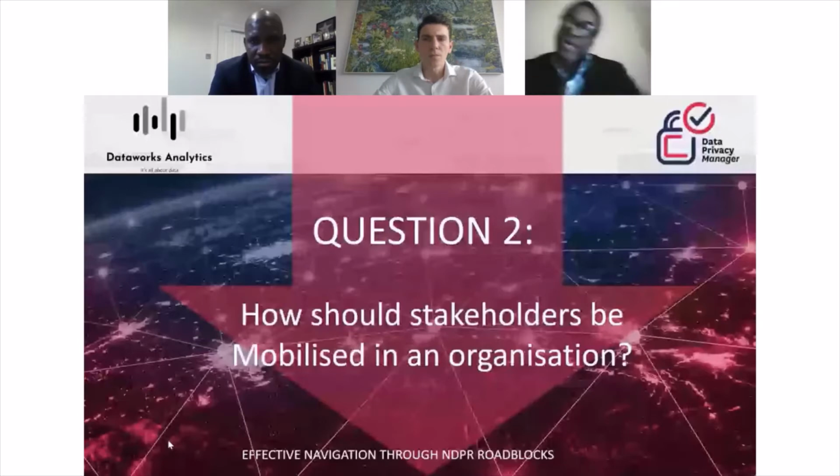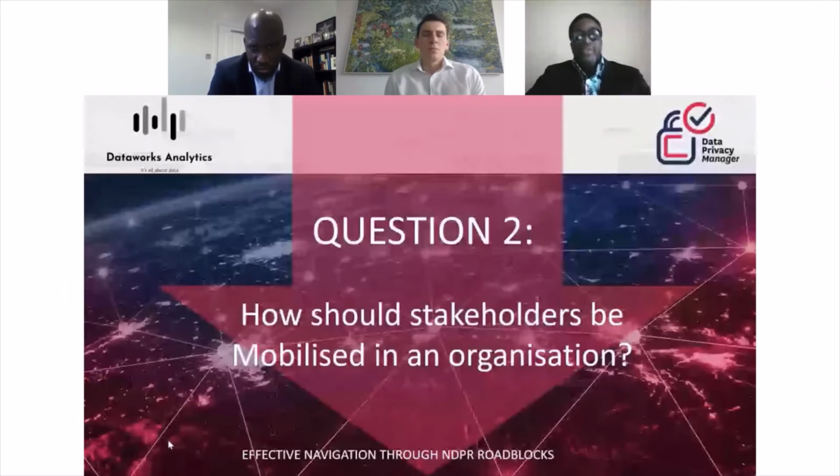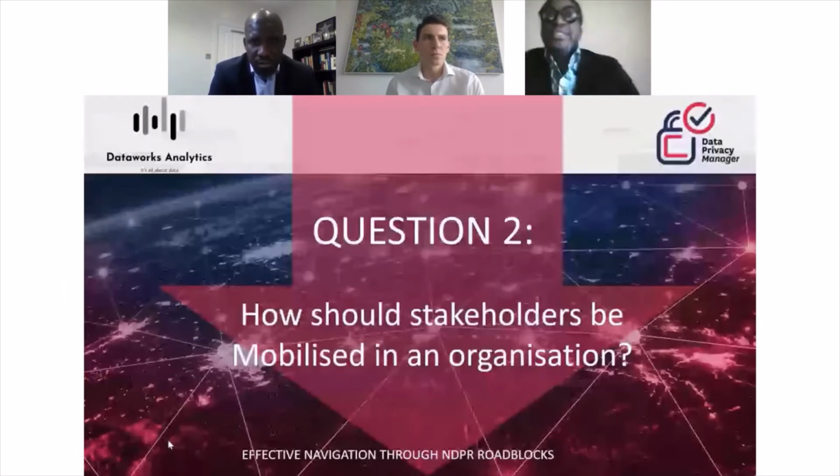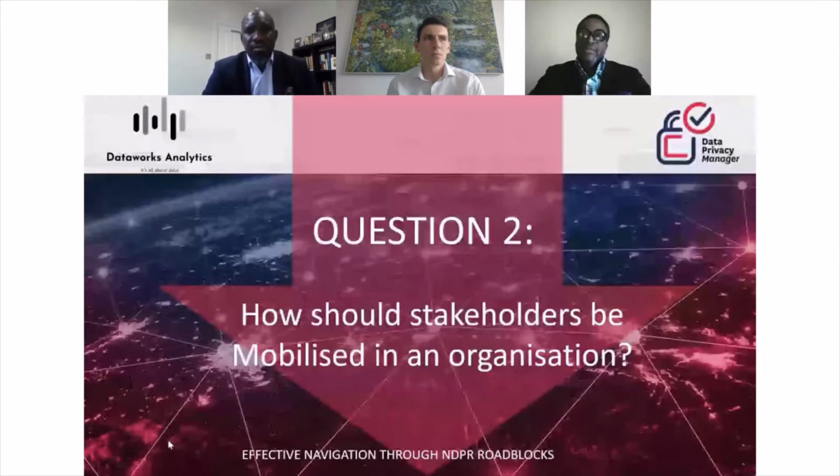First, you have to identify your stakeholders. And there are 3 steps to doing that. The first one is identifying the stakeholders and their interest in the project, either positive or negative. Secondly, assessing the influence, the importance and the level of impact of each stakeholder. And lastly, identifying how best to engage the stakeholders.